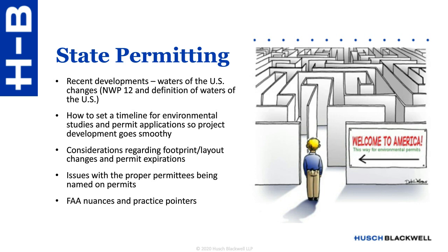So we're going to talk about that, and then also permit expirations. If you have a regulatory department, then often that gets consigned to the regulatory department, but it's critical, particularly when you're an organization that has a lot of projects with a lot of permits and necessary renewals, to track those, to establish spreadsheets, and to establish triggers that alert everyone that it's time to re-up, let's say, your ERCOT generating capacity report, which is an annual thing.